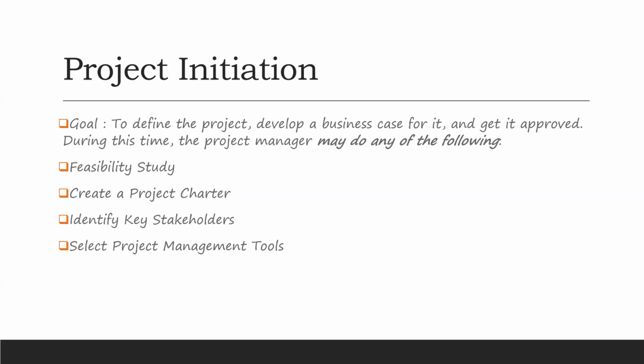So in some projects, like one of the projects that we implemented that I ended last year, we did a feasibility study in the beginning, and we did a baseline and an end line. The purpose of the feasibility study was for us to be able to determine whether the geographical target area and population that we are looking at is the right place to implement this project. And we discovered, yes, it is so. So after that, they needed to do a baseline. The baseline was done, and then after that, the project could kick off.